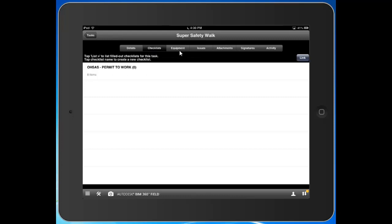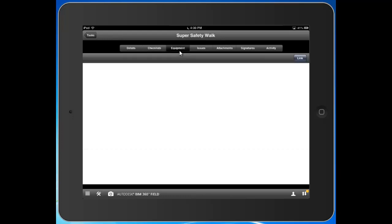Maybe if there were pieces of equipment, you could see those. Typically, teams will use this function and they'll link in equipment for tasks related to the functionality and pre-functionality of some of their equipment in the system. Maybe it's a systems test or a pre-functional test on air handlers. You'll be able to link those in here for a given task.